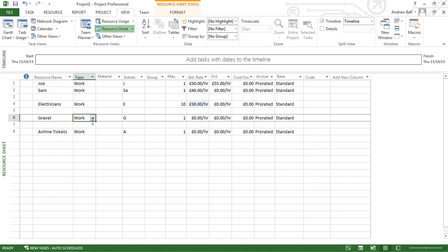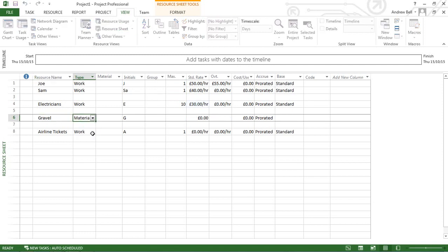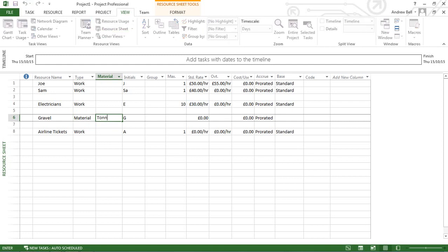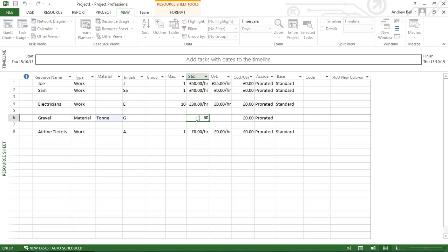Gravel is a material resource. I'm going to buy this material by the tonne, and it's going to cost me £60 per tonne. Because it's a material resource, it doesn't have a calendar.